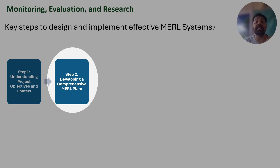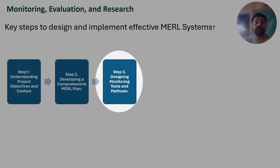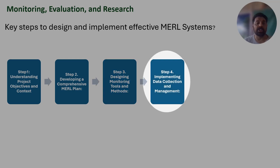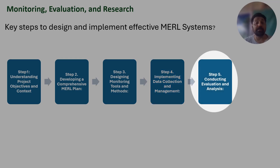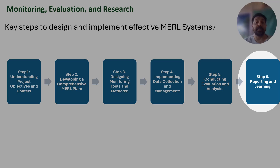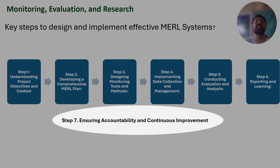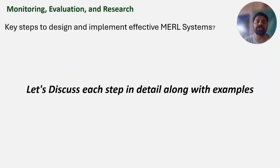The second step is to develop a comprehensive MNE plan. The third step is to design monitoring tools and methods. The fourth step is to implement the monitoring system and manage data collection. The fifth step is to conduct evaluation and analyze results. The sixth step is reporting and learning. The seventh step — which is cross-cutting — is to ensure accountability and continuous improvement.